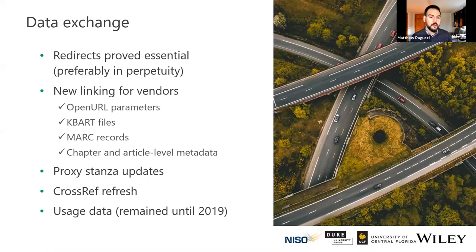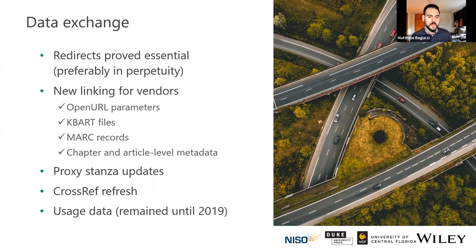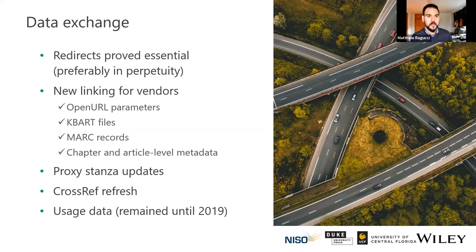Usage data was also important. We kept the old platform on life support for library administrators for a little bit because we didn't want to create an environment where users had to download all their usage statistics and then have them disappear when the new platform launched. We used the COUNTER 5 rollout in 2019 as an opportunity to bring the legacy COUNTER 4 statistics onto the new platform, while also providing statistics in COUNTER 5. So we left that stuff around for a bit so libraries would not be left hanging when they needed those statistics, which are so important in renewal decisions.